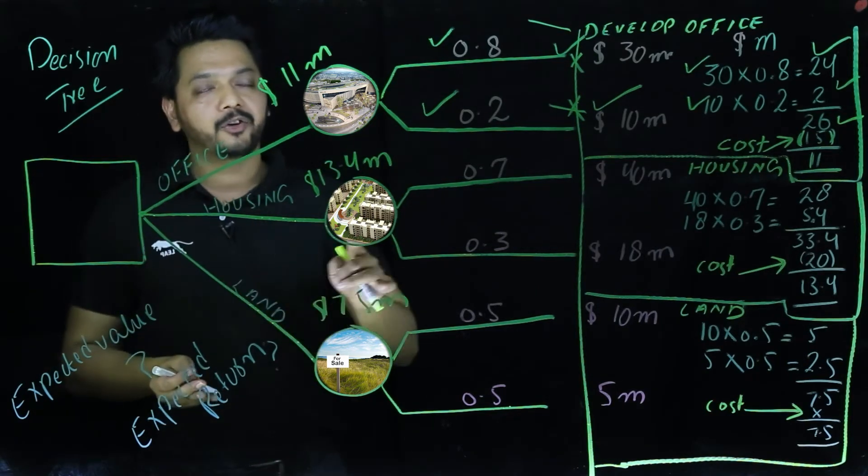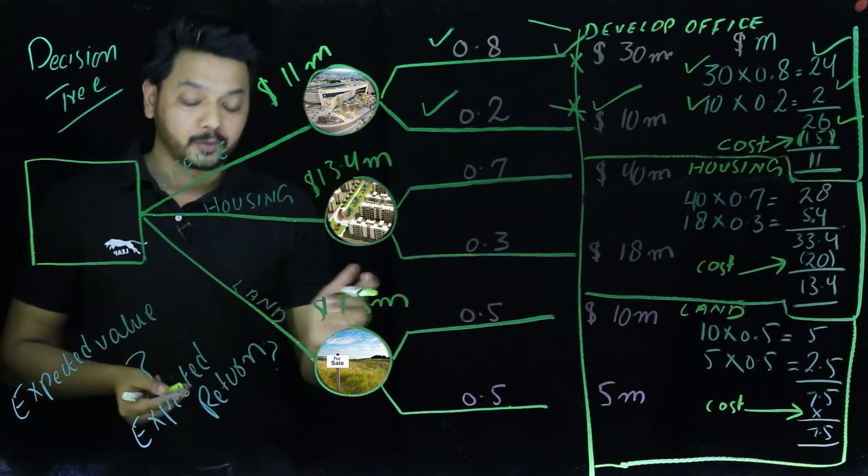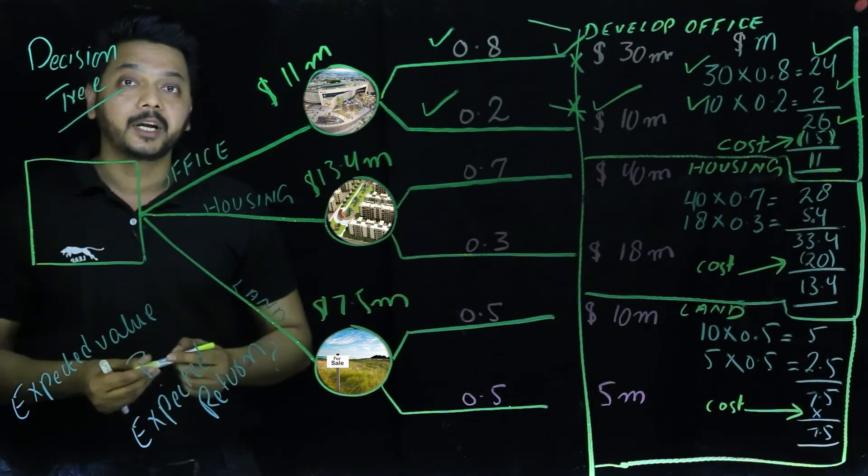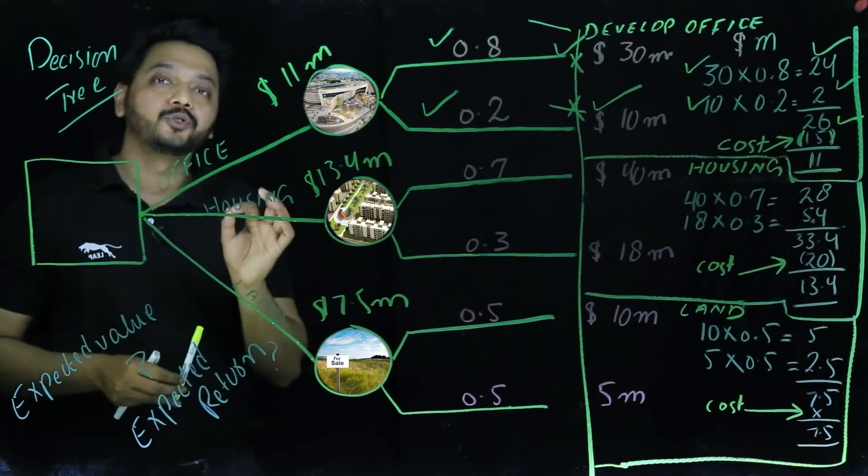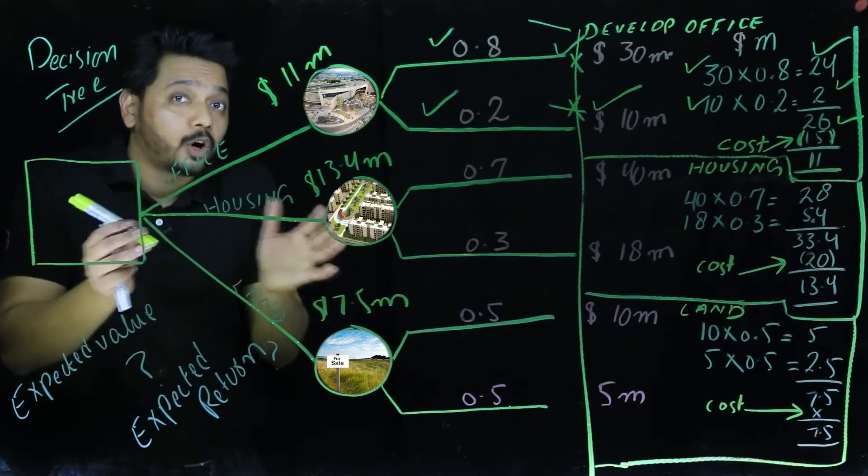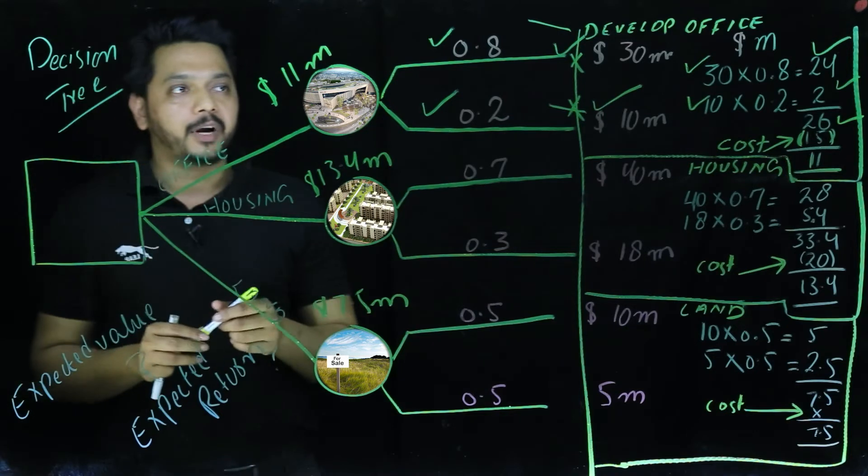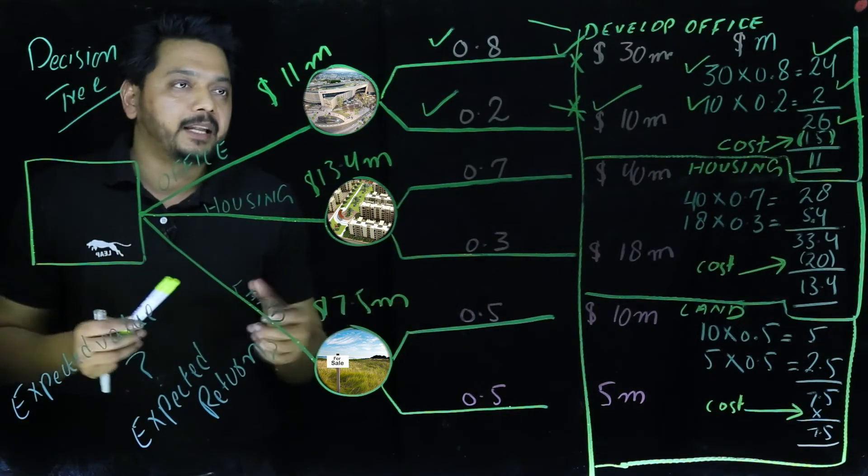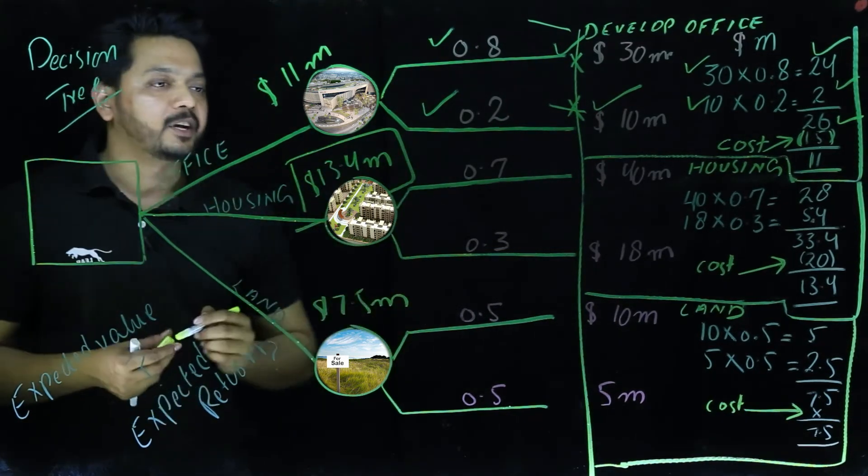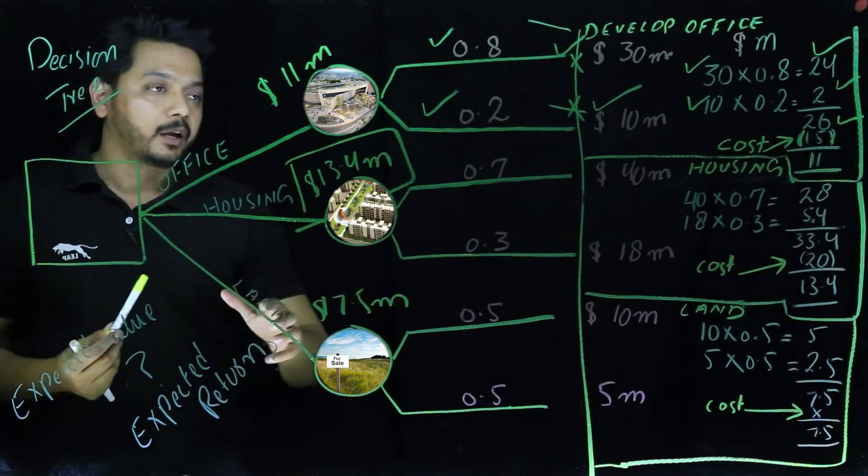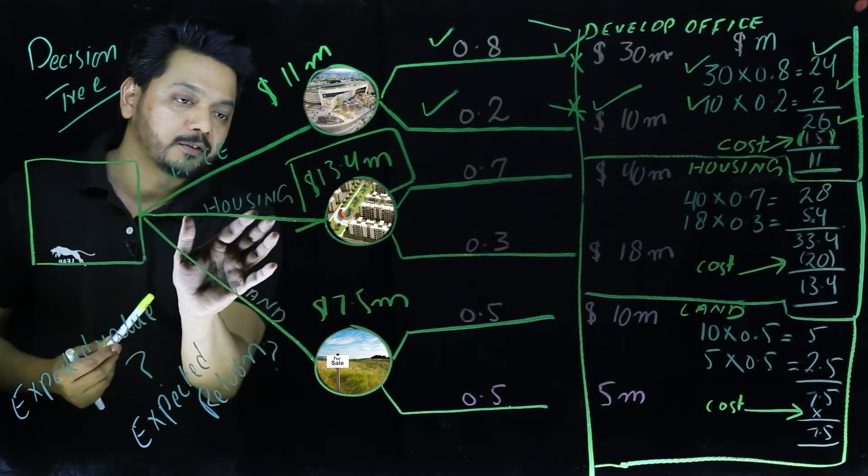Since decision tree analysis gives us a quantitative analysis, one of the limitations of decision tree analysis is that it gives you a quantitative analysis, it does not touch the qualitative analysis. So when it comes to quantitative part of it, we could easily say that the maximum expected return that we are getting here is from building housing scheme.